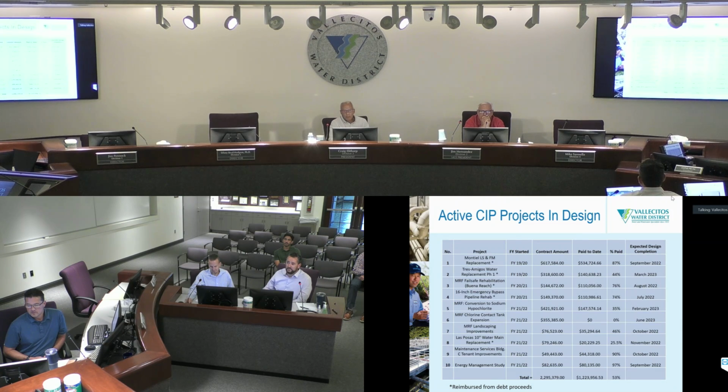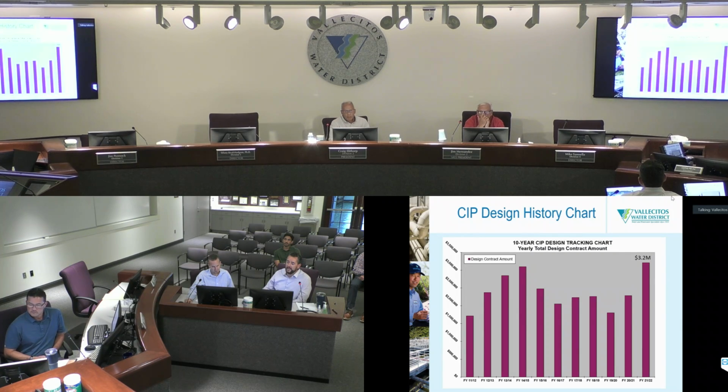And as you might expect, when we are heavy in design, we are kind of light in construction. And when we're heavy in construction, we're kind of light in design. This is actual data that we pulled from historic fiscal years going back to fiscal year 2011-12. The data is representative of what we would expect. As you can see, it's very cyclical, almost a sine wave.